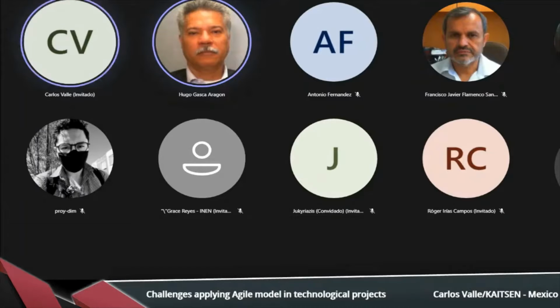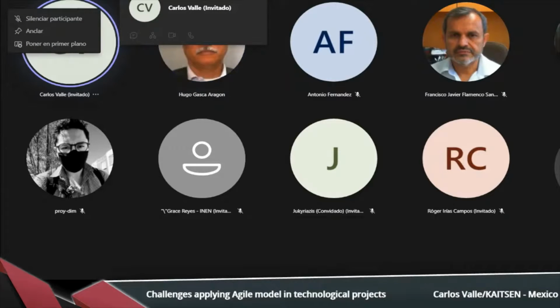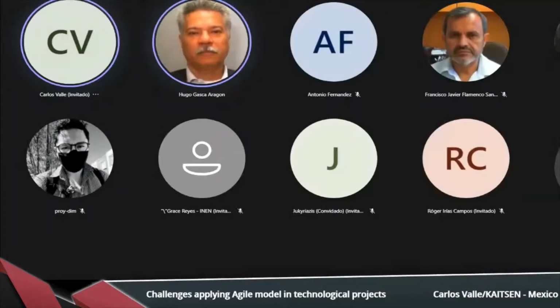Yeah, normally, as I said, to use the agile methodology we have to have this iterative and incremental development. When there's a product that doesn't have to have that PLM, the life cycle being changed or improved, normally agile doesn't work, because we can have the whole planning and just follow the waterfall methodology when we have it all clear, or where the maturity of the process or of the solution is such that we have a really small requirement.